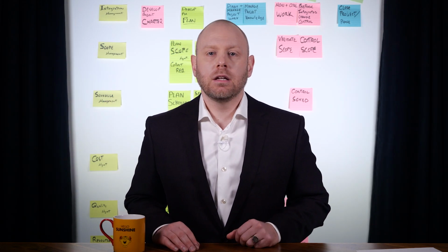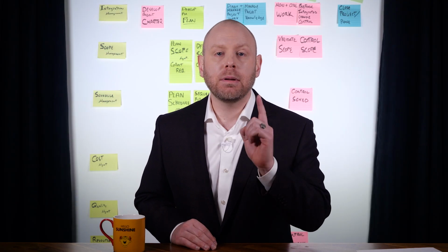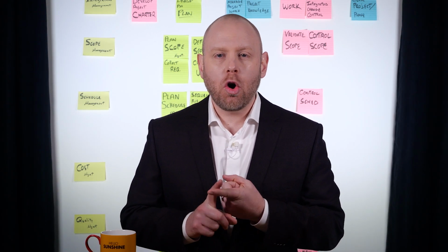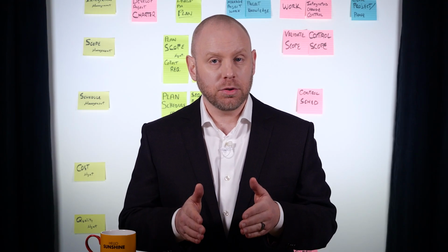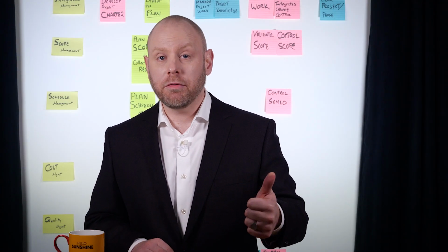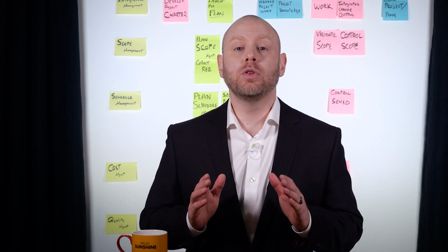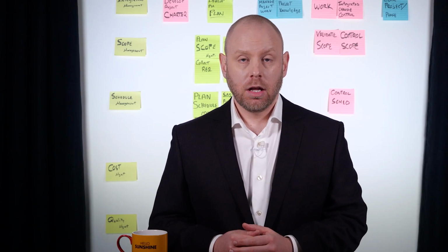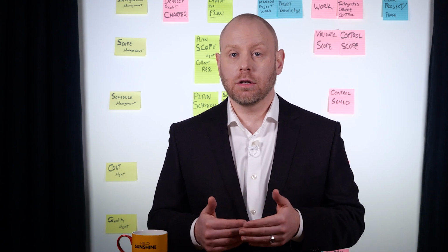This report will be added to with our quantitative and qualitative analysis, that's coming up next, and plan risk response process. So this report provides sources of overall project risk with insight on the drivers of overall risk exposure, a summary of information of individual project risks, such as the number of them, the categories and metrics and trends around those risks. Now, before we move on, we need to update our assumption log, putting in new assumptions that may have now been identified. We have to update our issue log with new issues that have been uncovered and our lessons learned register.